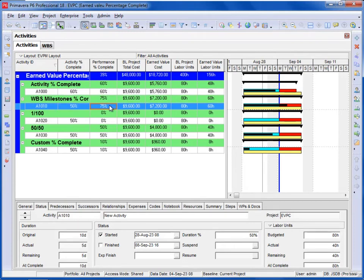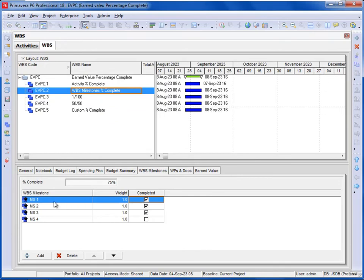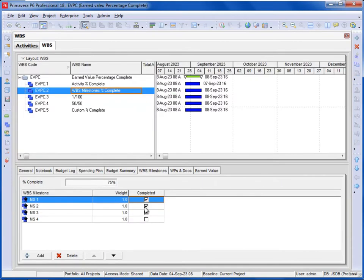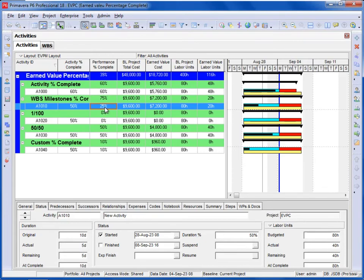With the WBS Milestones technique, the Performance Percent Complete is 75%. This is calculated from the milestones — there are four milestones each with a weight of one, and three are complete, giving 75%. If you uncheck two of them, you then have 25% complete, and therefore the Performance Percent Complete becomes 25%.